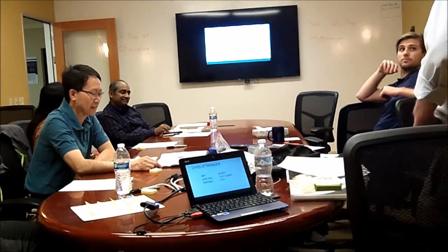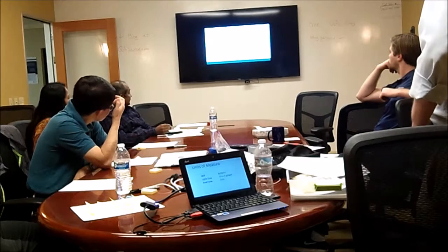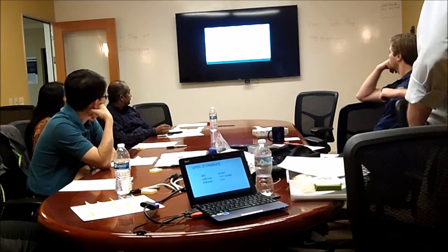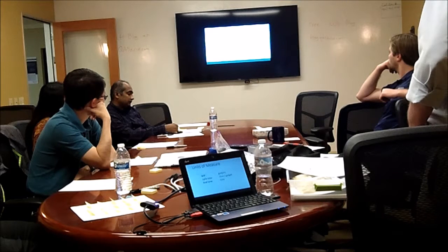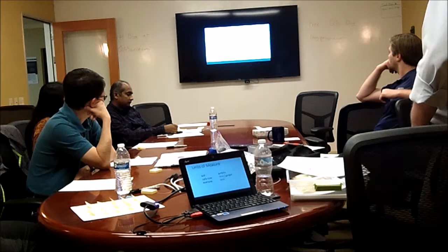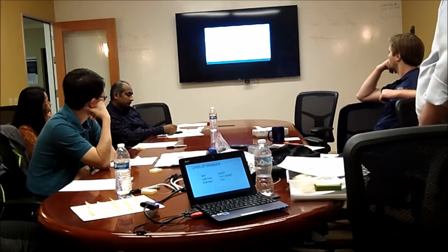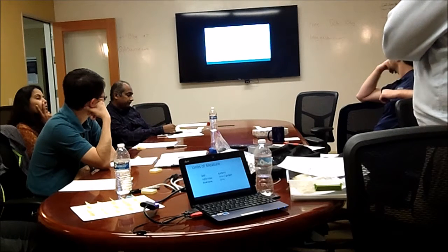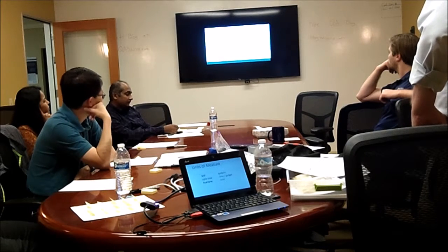So, units of measure. I was going to use the word units as the units for WIP, but I didn't want the units to be called units, so I thought it was confusing. So I'm just calling these things gadgets. The yellow sticky is a gadget. Whatever feature you're putting in your software or story you're working on is a gadget. And then the cycle time is expressed in time per gadget. That's the units. Lead time is expressed in time only. It's interesting that they call cycle time time. It's kind of time, but it's specifically time per gadget. And algebraically, that works out.